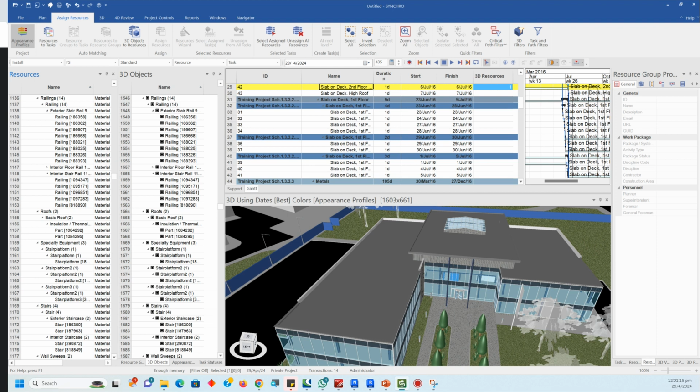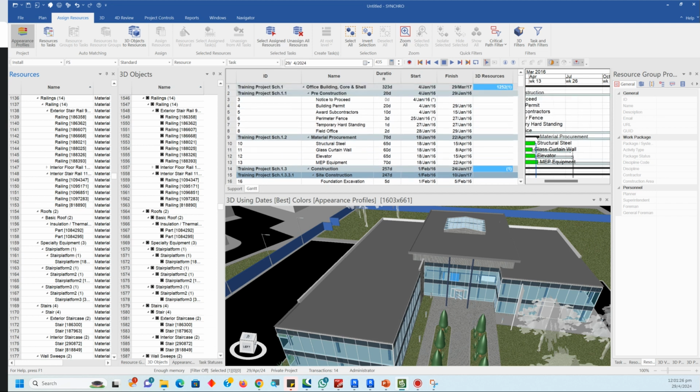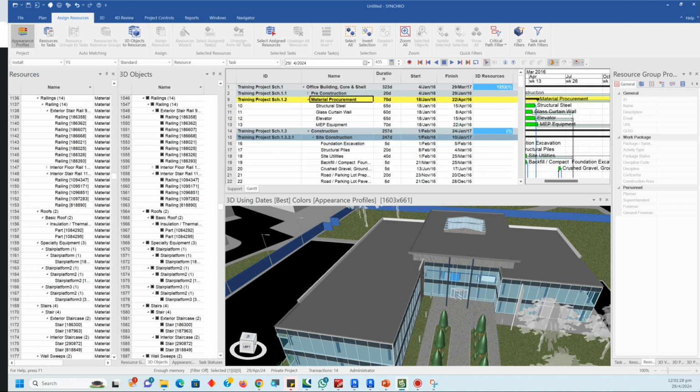Okay, I understand. Usually the construction happens zone wise, and everything they will include in this schedule. So you just need to import the respective 3D, search the activity ID, and keep on assigning. The planning is already done.